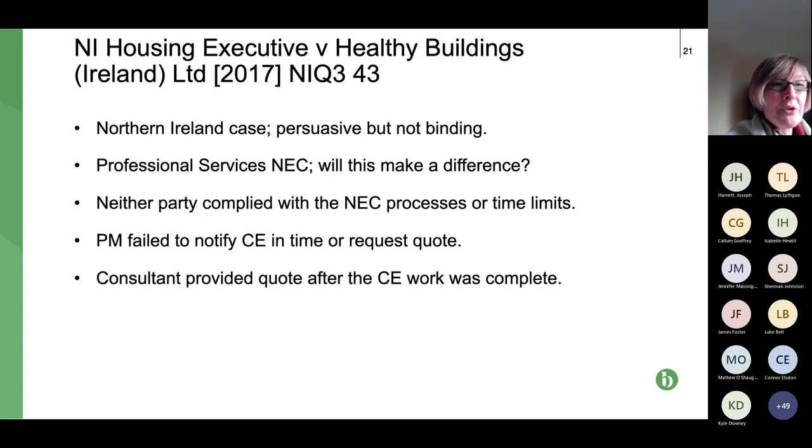from what we've seen about the switch date, you calculate your actual cost up to the point when the PM instructs the additional work, and you do your forecast cost from then onwards. And the guidance notes are clear that doesn't change if the circumstances change. So under the contract, technically that was correct. But of course, it's a slightly false way of doing things when the work's being completed. So bear all those points in mind.